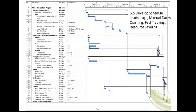The project manager is now ready for the next process, 6.5 Develop Schedule. The first step in developing a schedule is to apply leads and lags. Leads and lags are time constraints that take place between activities. In our example project, the project manager conducted two bid conferences. After the bid conference, the potential vendors will start to prepare their responses to the RFP. During the preparation of the responses, the vendors typically request information and clarification from the project manager regarding the RFP.